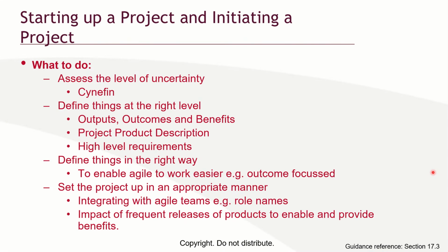And that is also where we use prioritization. As I earlier mentioned, you have to use MoSCoW to prioritize your product backlog. You just don't put all of the features together, all of the things that you want to do. You must have a priority, a degree of uncertainty. Which one are you likely not to do?